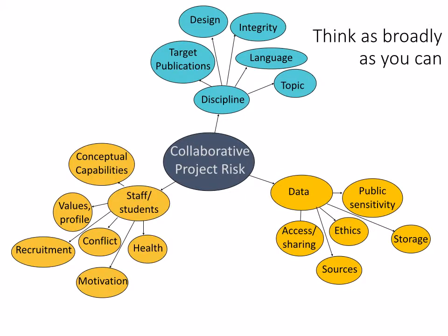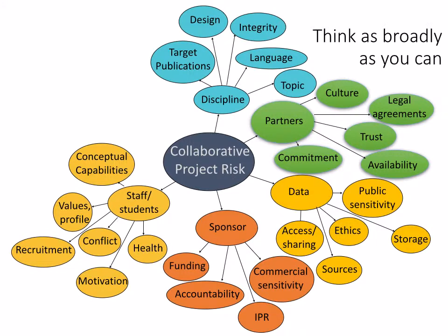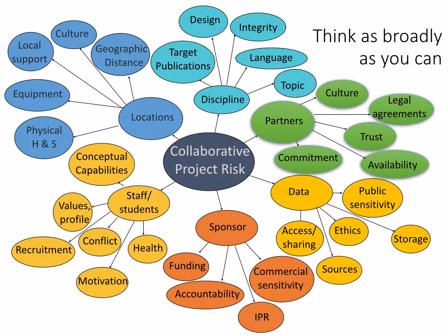You should allocate some time on the agenda of each of your project meetings to discuss risk. At the start of your project, you could ask each partner to think about these different topics and report back on their ideas on the possible risks at your first meeting. You could use these examples as a starter to identify the risks that are most relevant to your particular collaboration project.